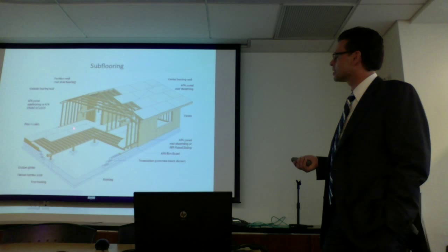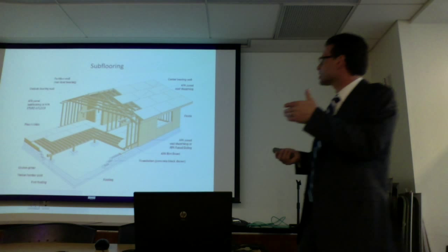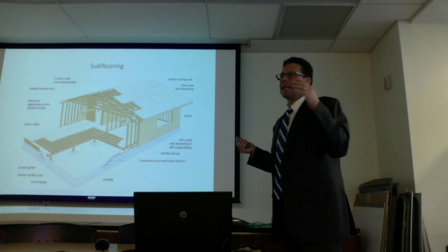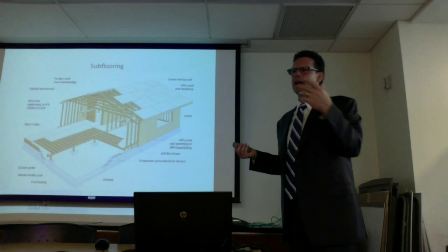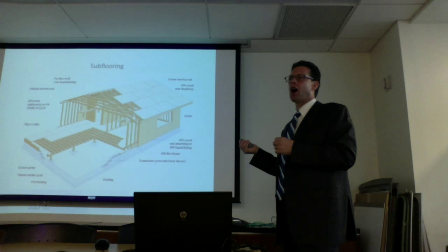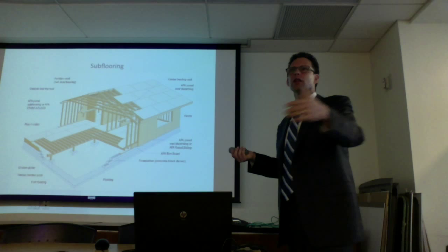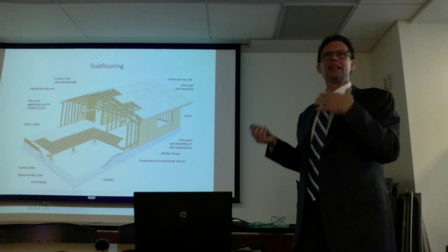You can't say, okay, I'll take the subflooring out of the room and put it in the footprint, because it takes our guys, two mechanics, two laborers, and Glenn McAllister or somebody stopping by the job checking up on it to replace the subflooring under walls. So if it's a Breezy Point bungalow or a Long Beach bungalow or a bigger house, when you have to replace subflooring under walls for a small to medium-sized house, it takes a week to do.